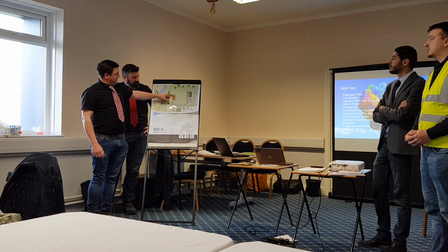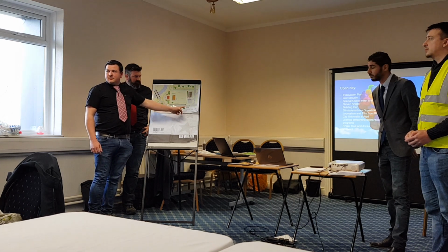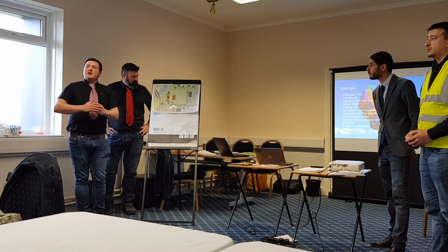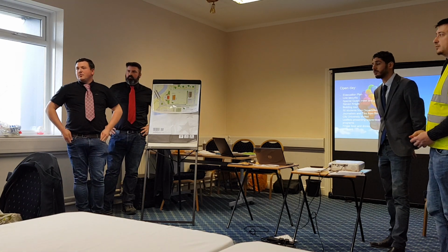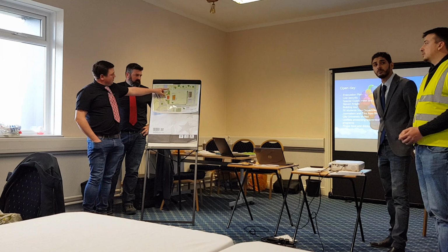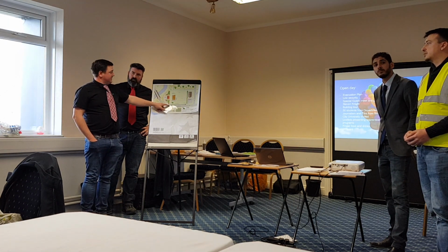This work will be carried out while the contractors are installing the hoardings. We will keep each trade away from each other as long as we can. The hoarding and CCTV installers won't be allowed to work down this area until it is clean and all decontaminated.